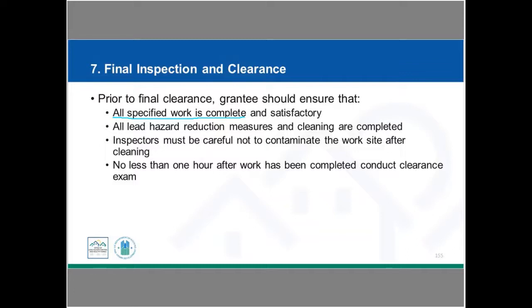So the program itself and the staff that's working on their behalf need to make sure that that work is inspected, that it's done appropriately, and it's found to be satisfactory. So that on-site inspection would be completed. We're making sure that all of those hazard reduction measures that we included in the specifications have been completed, but also trying to make sure that the cleanup has been completed. So we'd be looking for visual evidence that it looks like they haven't done any cleaning, that there's a lot of dust, there's debris still in place.